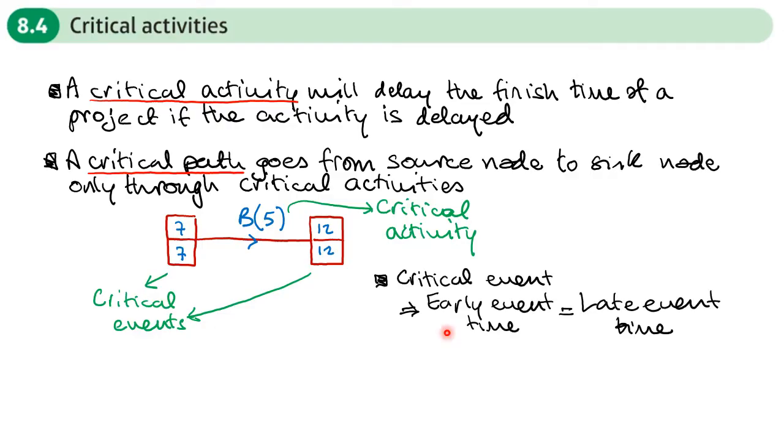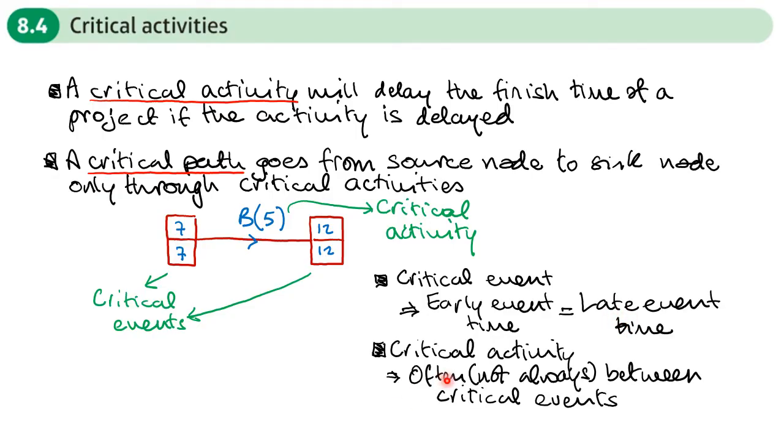So in a critical event, the early event time will equal the late event time. And a critical activity is often, not always, I've explained why it's not always, between critical events.